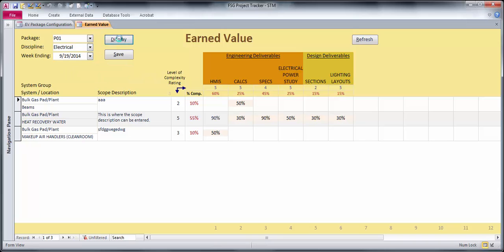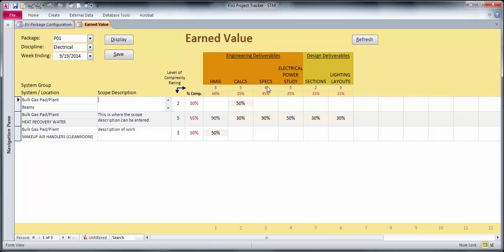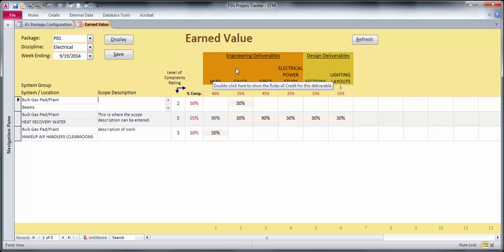And what it does is it runs a cross-tab query of the combinations of packages and disciplines in the week, along with the deliverables that were selected on the previous page, and it creates a temporary table of that cross-tab and then it binds this form to that.